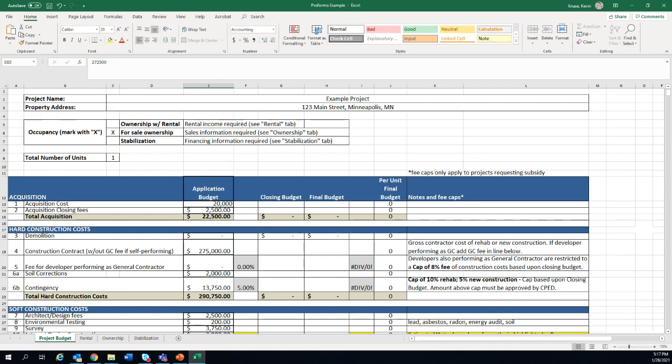Yeah, I'd say generally speaking, our program makes a funding commitment based on what you believe you will need at the time that you apply, just like Kevin was framing. And then at the end of a project, we do something called a final reconciliation process, where we look at what your total development costs actually were, what your sales price actually was, and what the amount of funding that your home buyer needed in order to afford the property actually was.